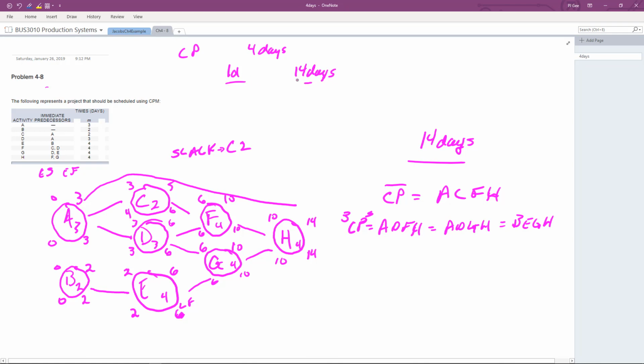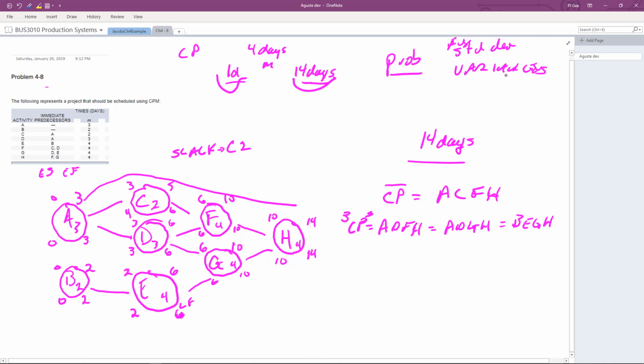And we're going to keep track of some of this data in our company so that we can get more accuracy with this. What you'll see is this is the optimistic date, and this is the pessimistic date, 1 day to 14. And the nominal, which we show here as M, is pretty much the average. Most frequently, we get things done in 4 days. Okay, so we're going to have to talk about probability on this, because as we start entering this, we're going to have to understand such things as averages, standard deviations, and even variances, and we'll get into that in class as the best way to handle that. There you have it.